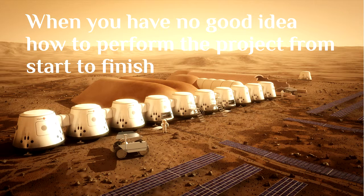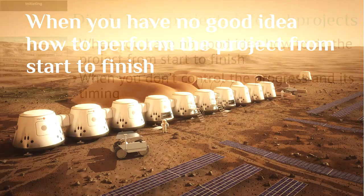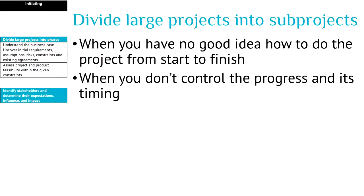The other reason to break up your project into smaller projects is when you don't have control over the progress and the timing of the tasks. For example, when a client has to confirm certain stages, or to give approval, and a client takes their own time to confirm, and you don't have any control over when they do that and when they will be ready, then you must break up the project. You can think of many situations like this. Then break it up in smaller projects, of which you do have control.